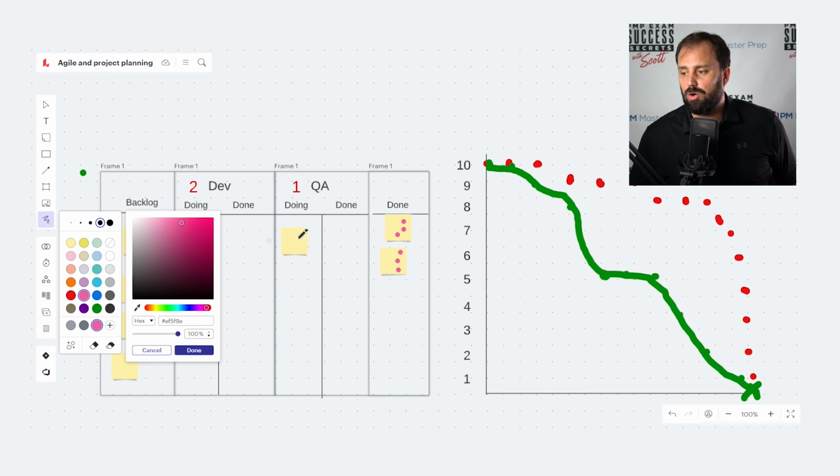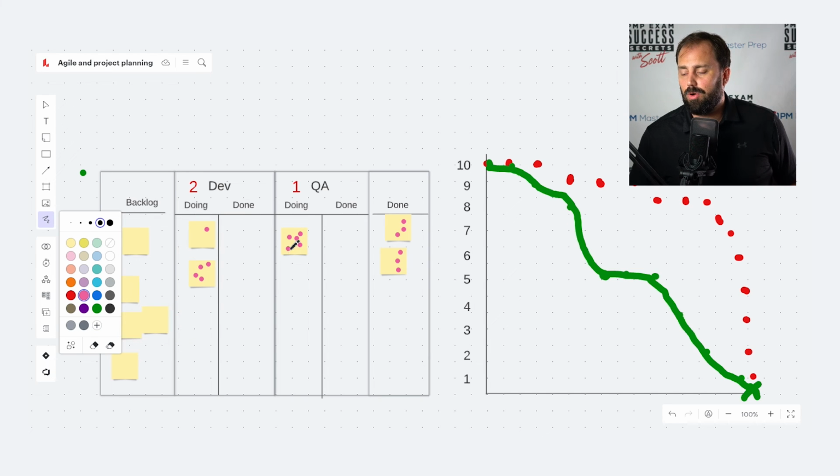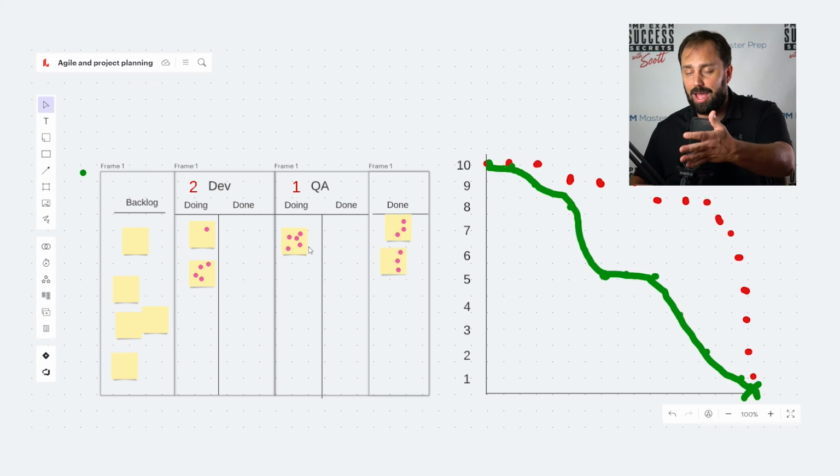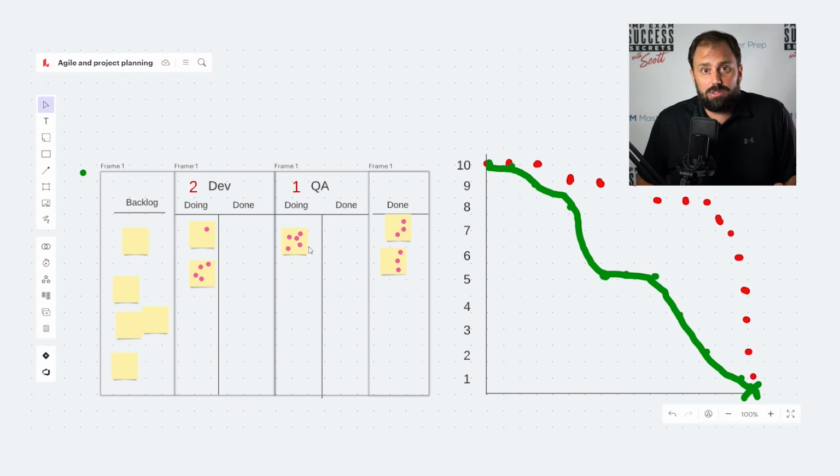If that circle had 4 or 5 stickies, there's no way when you went to the board, you wouldn't say, hey, QA, you've had this for 5 days. Think about bigger teams. What do we have to do to get this out? What problems are we having? And then look at the consequences. It's log jamming this dude down here to say his has been sitting for 4 days or something like that. Actually, that would be log jamming everybody, but it brings a visual way to do it.